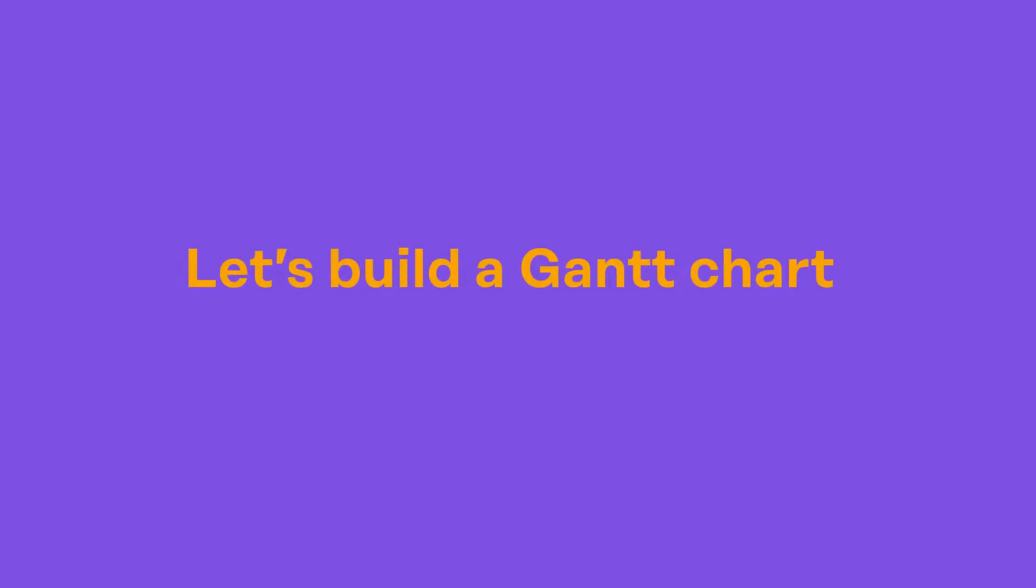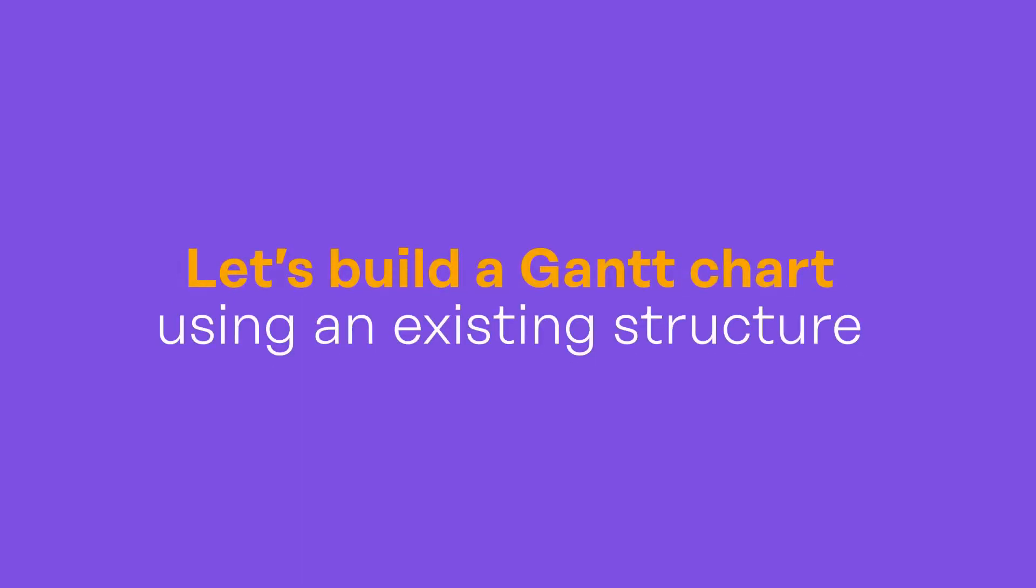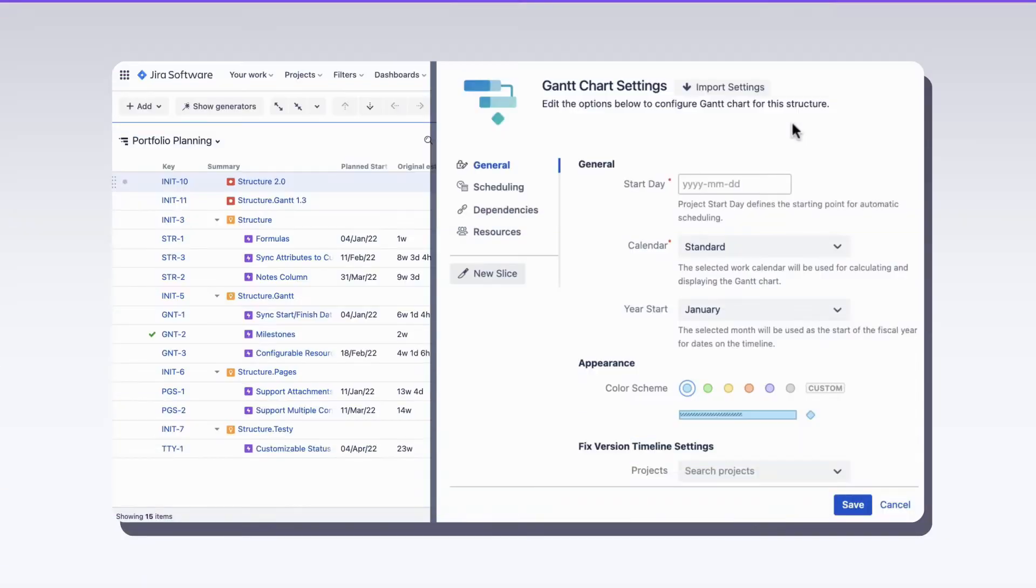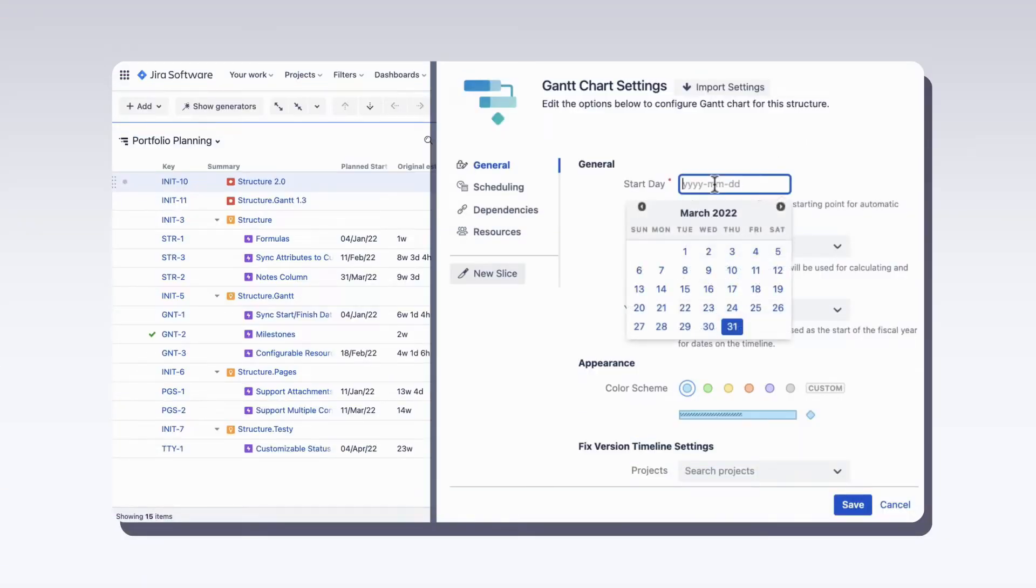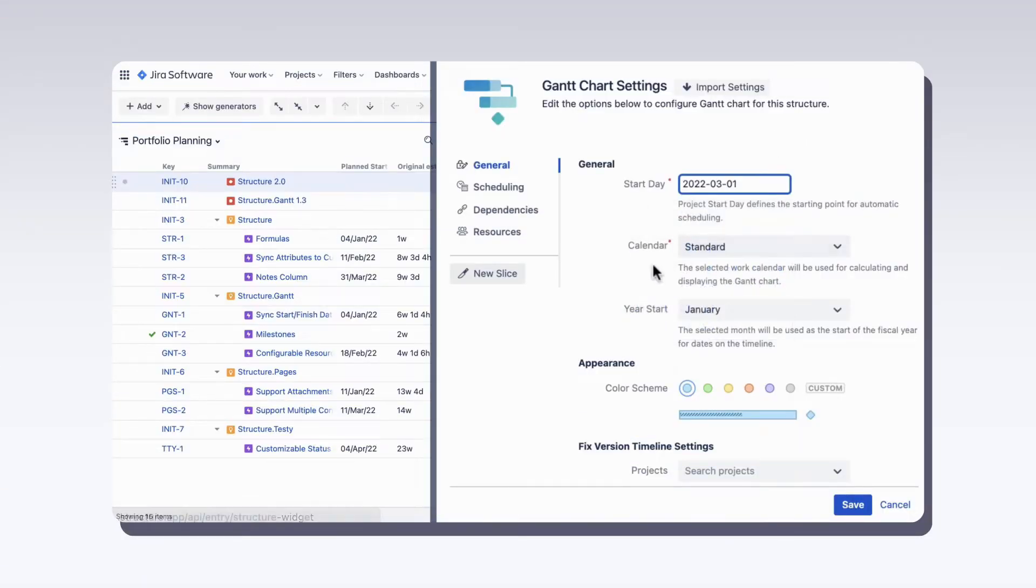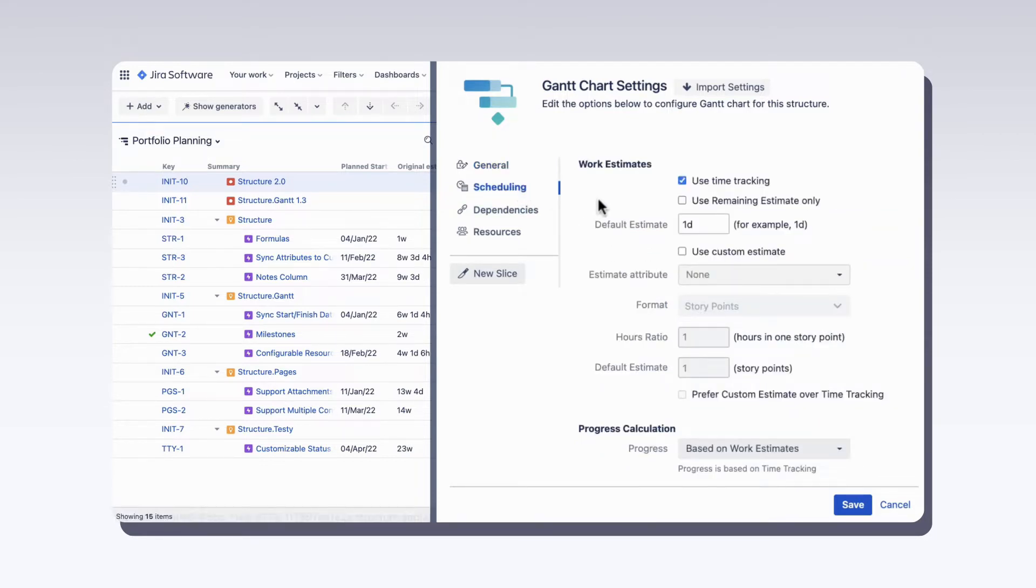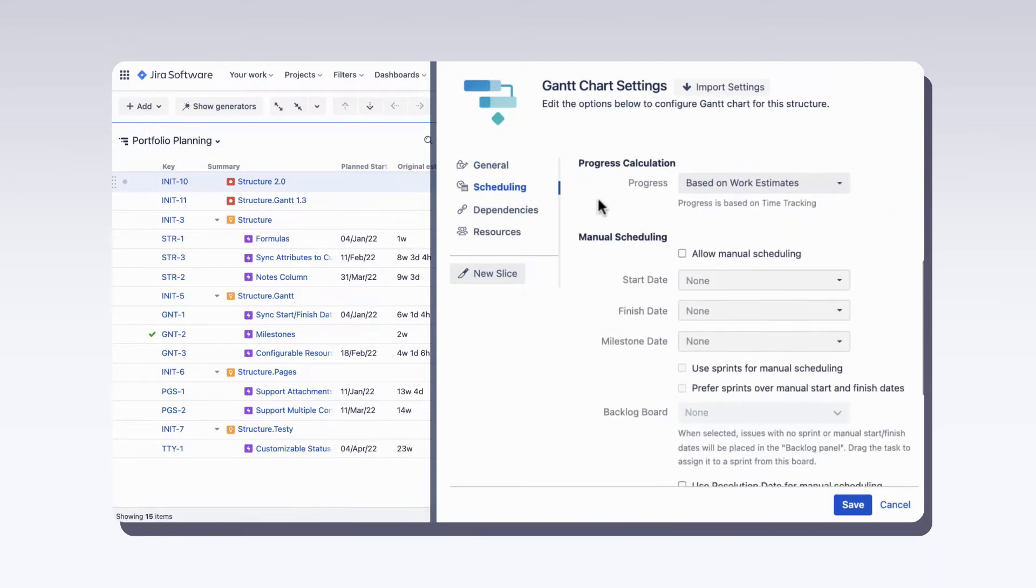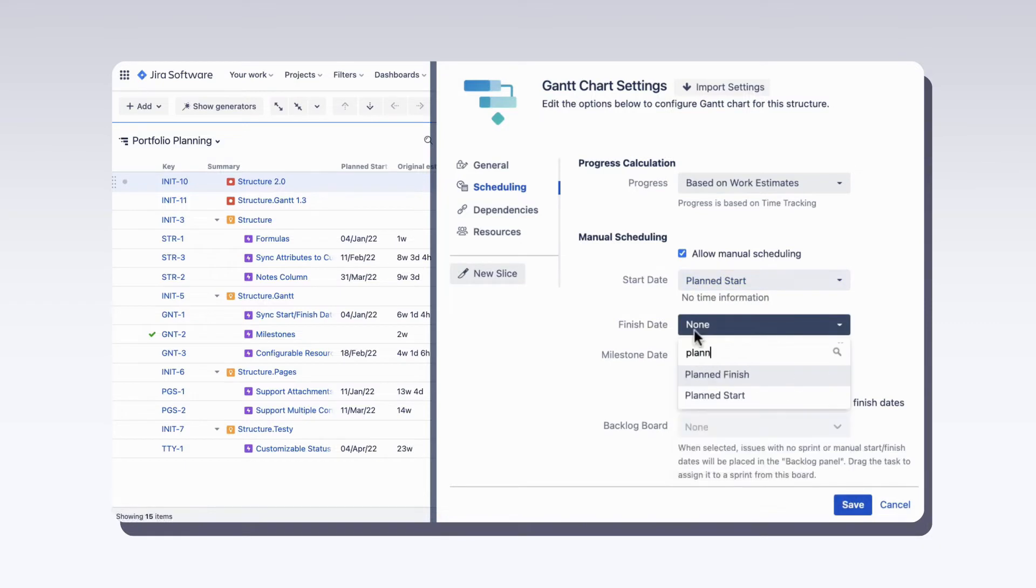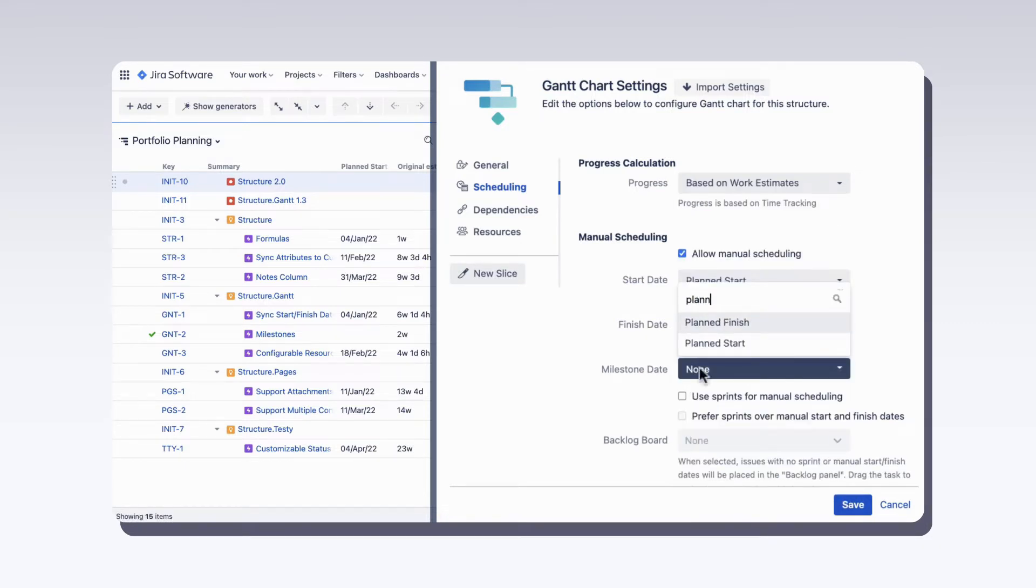Let's build a Gantt chart, which will serve as our project portfolio plan using an existing structure. First, we'll define the project start date and choose the calendar to be used. Then we choose which JIRA fields we want to use, along with the start and end dates.